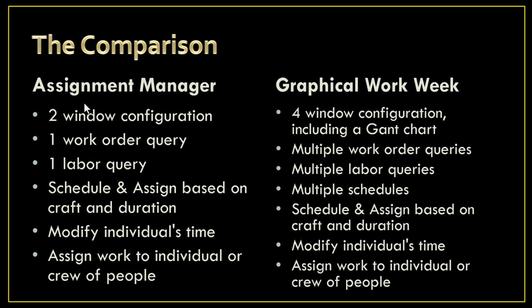And if someone calls in sick, you can then narrow your schedule down to just that backlog work orders to see what was assigned and unassign those work orders, add your PMs and your CMs back and divvy out the work because of that one sick employee. So the graphical work week view does have a little bit more capabilities to it, obviously. Also with that Gantt chart, you can reschedule things and move things around right on the Gantt, which people really like, just through drag and drop. But it's essentially doing the same thing.